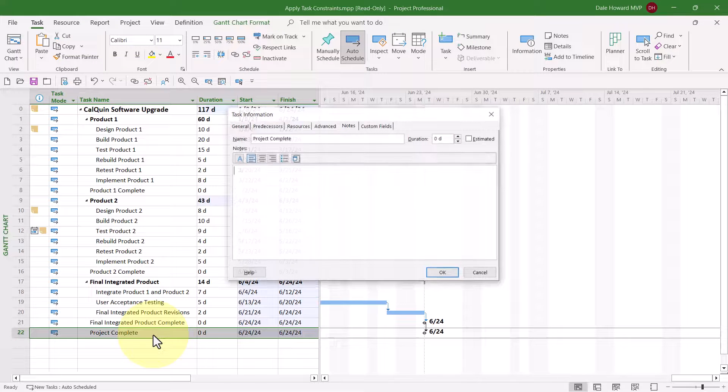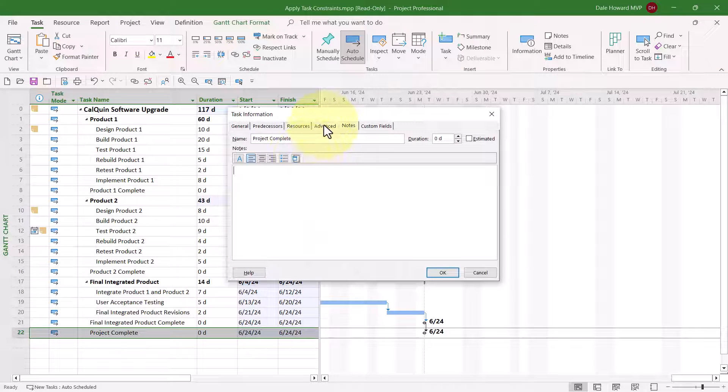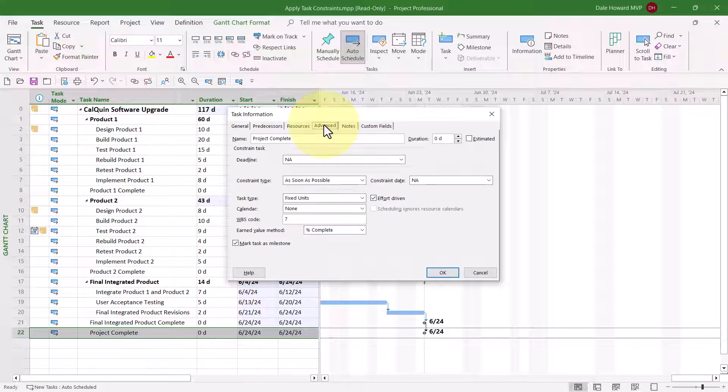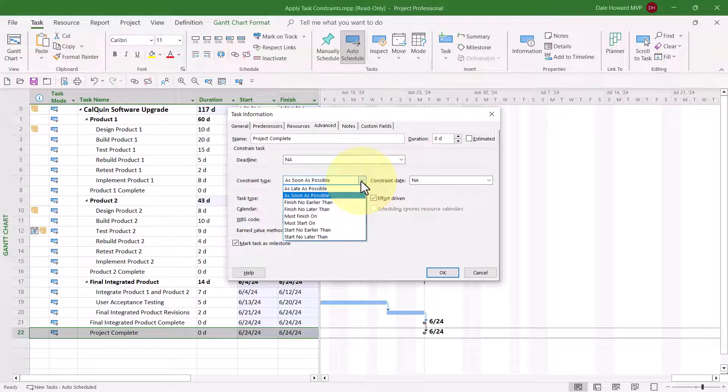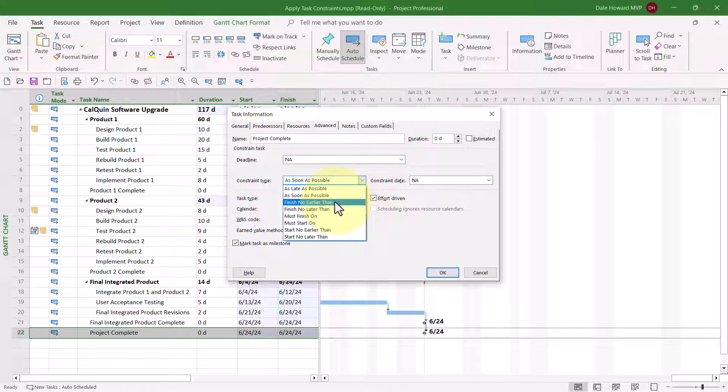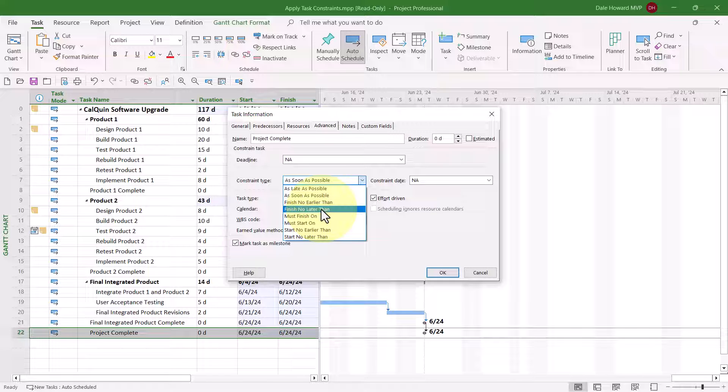I'll double click the name of the task. I'll go again to the Advanced tab. I'll click the Constraint Type Pick List button. And we have a couple options here, Finish No Later Than, or Must Finish On. Of the two, I would recommend for a target finish date, use Finish No Later Than.